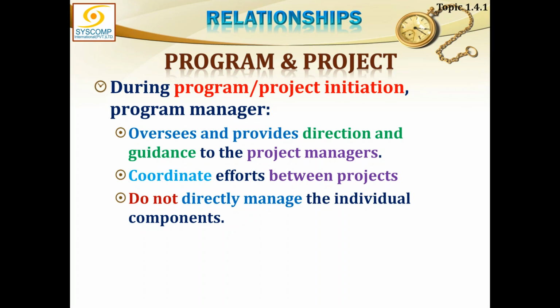You may define the project and major categories within the project. Otherwise, the remaining work breakdown structure will have to be created by the project manager. You do not have to advise him how that should be. So this is also, do not directly manage the individual components.